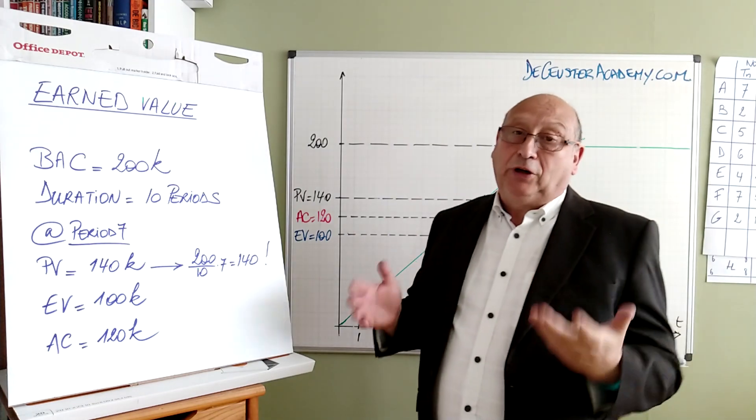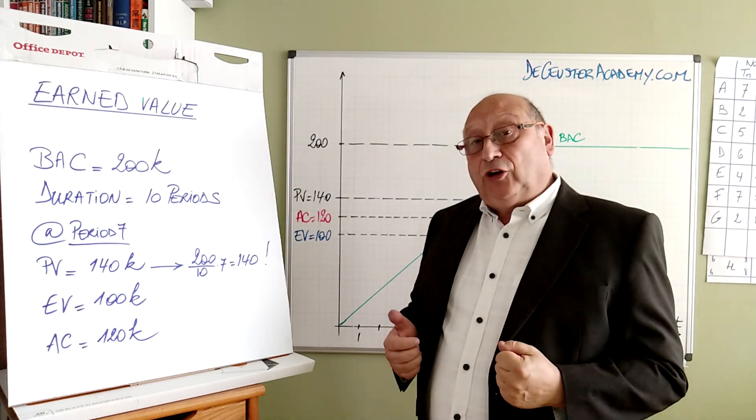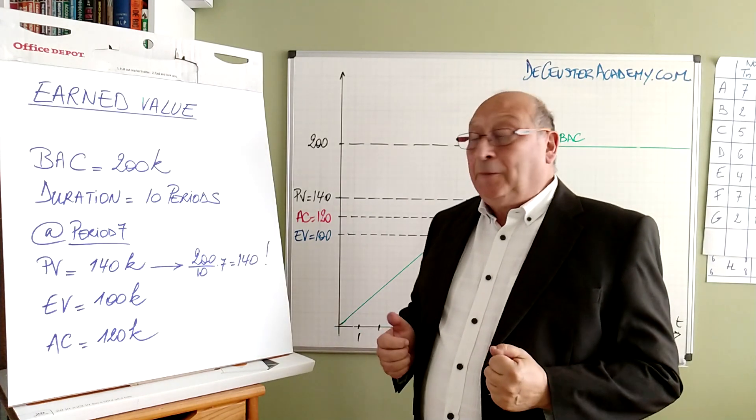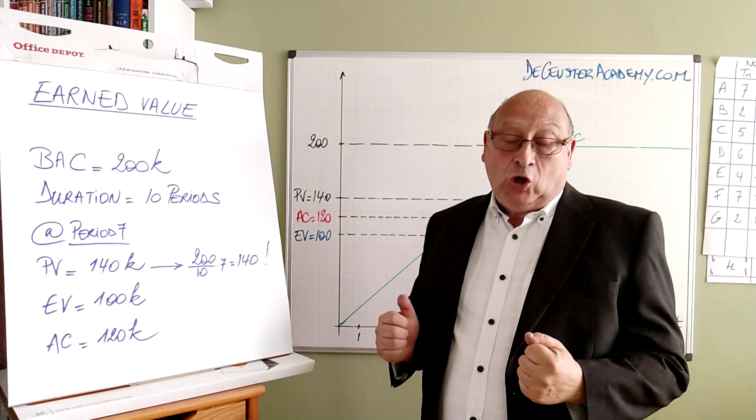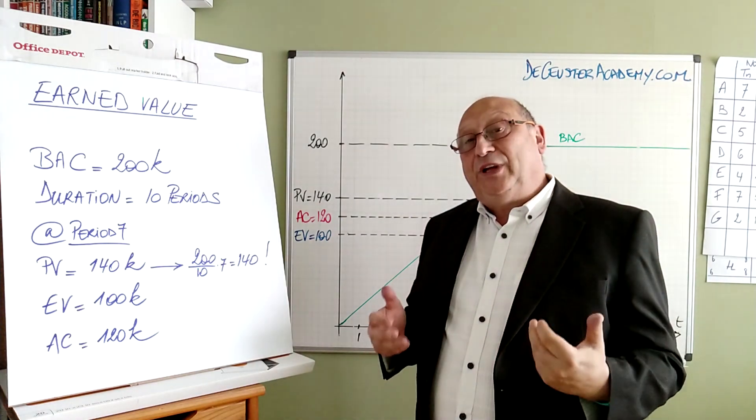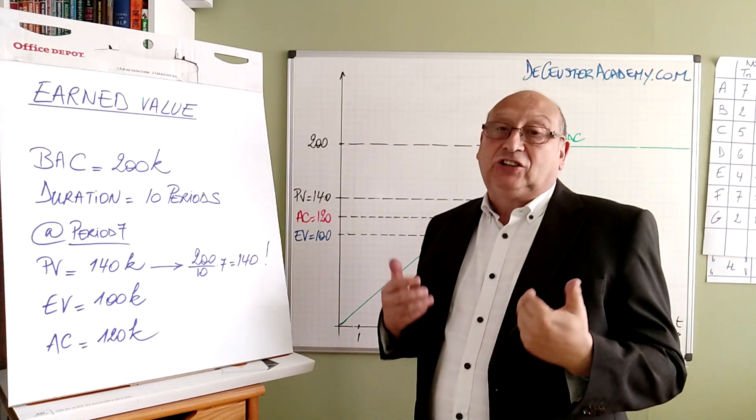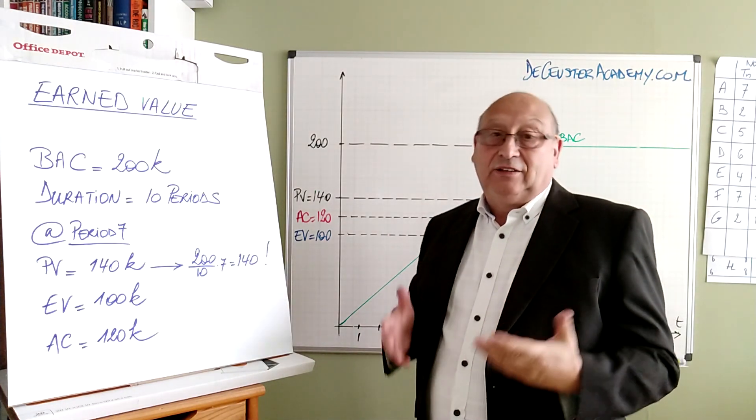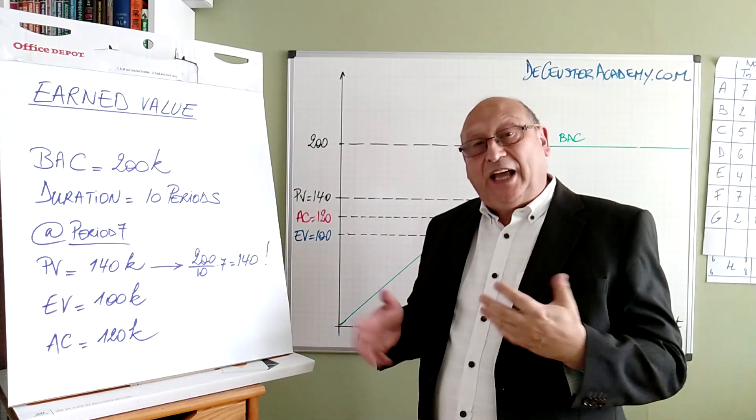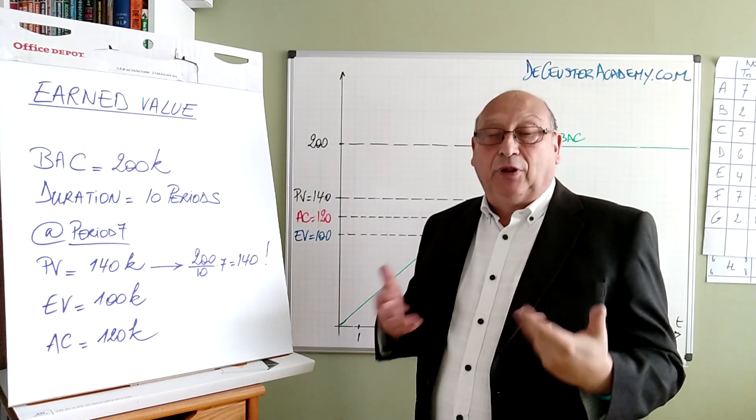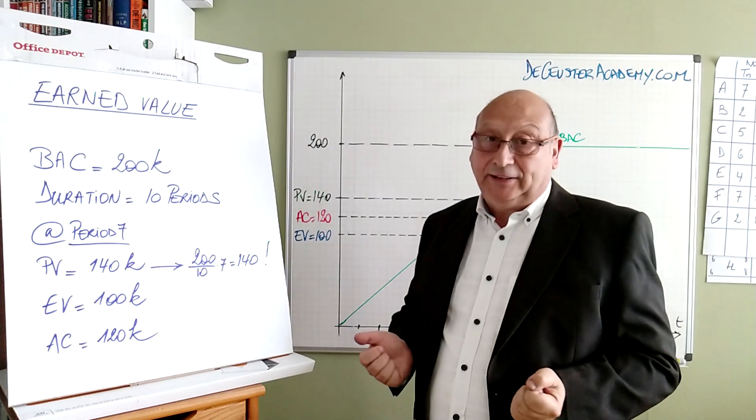We have a project with a budget at completion of 200k. The duration of the project is 10 periods, and that's the basic information that we have. To simplify everything we consider that the cost changes linearly between 0 and the 10 periods, so that we have a very simple relationship, a very simple s-curve which is basically a straight line.